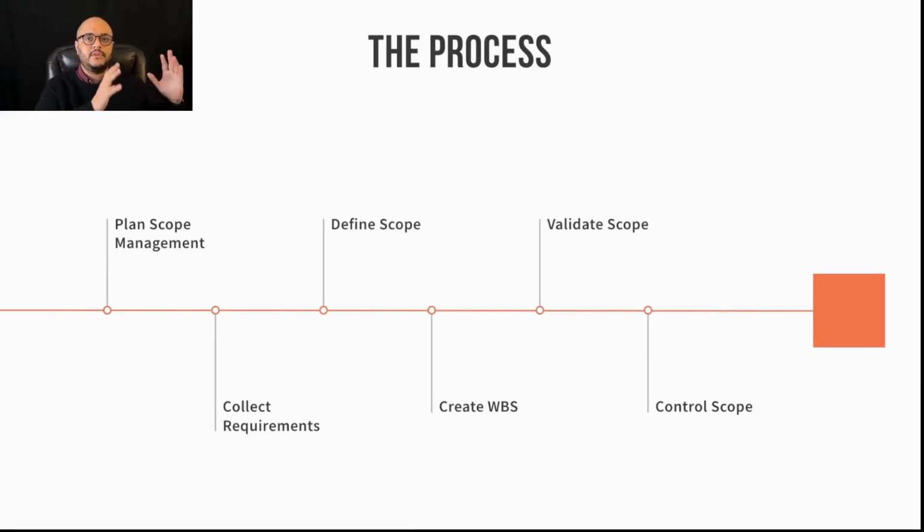We will deliver a website consisting of a homepage, an about us, and a contact page. We are not delivering e-commerce integration. You need to clearly not only define the scope, what you're doing, but define the boundaries. These are the limits of what I'm doing. Because the scope is connected to time, it's connected to cost, it's connected to quality, right? Project constraints.